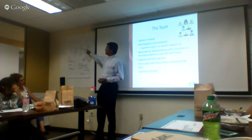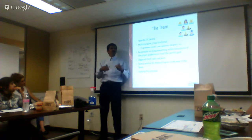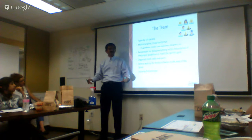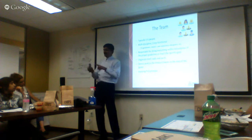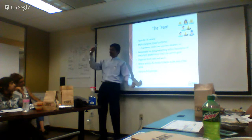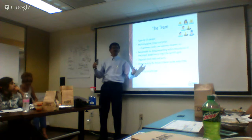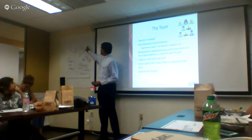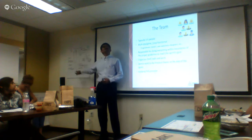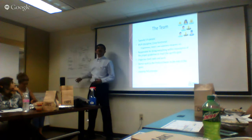In order to actualize the user story into the product, you need to perform certain tasks, right? I need to develop a UI screen. I need to develop the database. I need to develop code to connect the screen to the database. I need to test. Those are the tasks. So together, stories and tasks make up the sprint backlog, whereas the product backlog is made up of the user stories only.